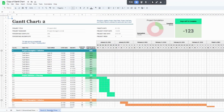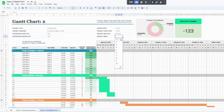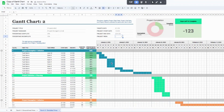Hopping over to the detailed view — the second tab at the bottom — this has the same features and functionality but with a couple of extra columns to gather additional information about the project. Everything up top is basically the same. The percent complete and percent incomplete automatically calculate for you, so no need to edit those. The project start date does need to be filled in on this sheet as well since it doesn't pull from the other sheet. The project week dropdown functions the same way here too.